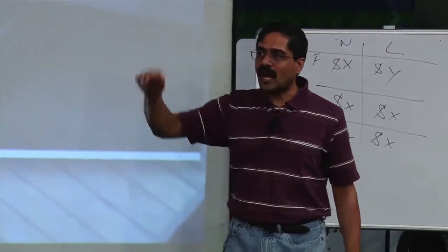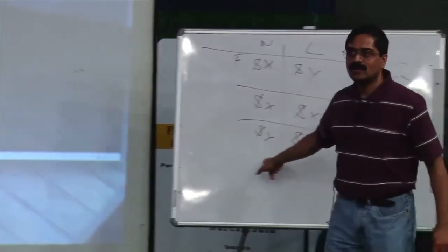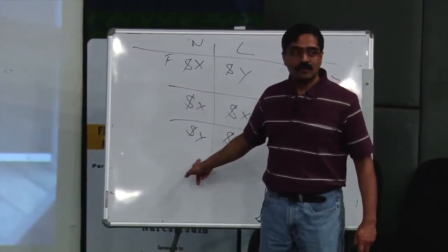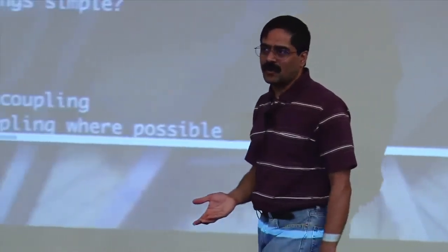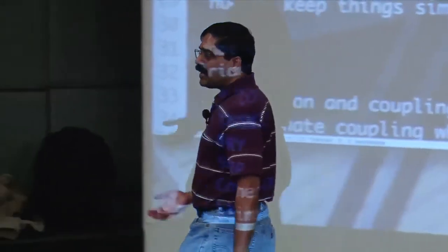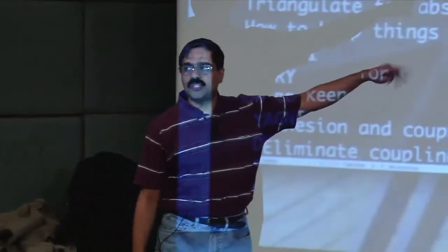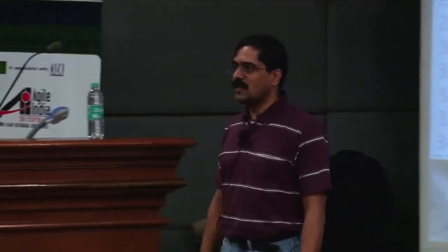If those two are very high, please do it now because it's expensive later. But also find out why it's expensive later than it is now. That is also important to know, right? There could be good reasons for it. Absolutely. But evaluate it. But notice in at least 2 out of 3 conditions, it is better to postpone.